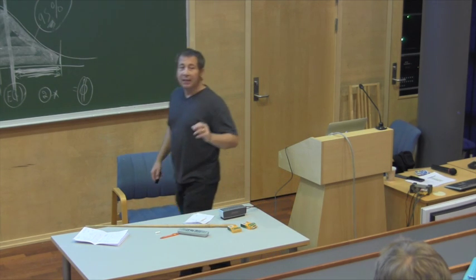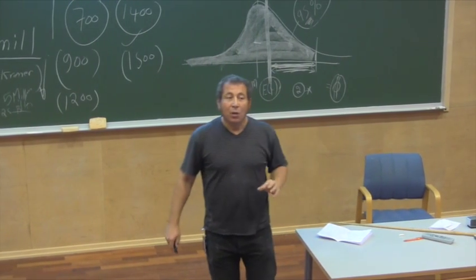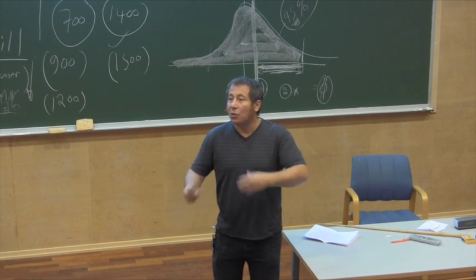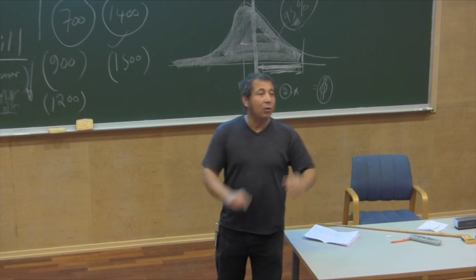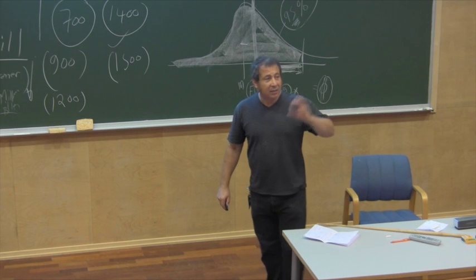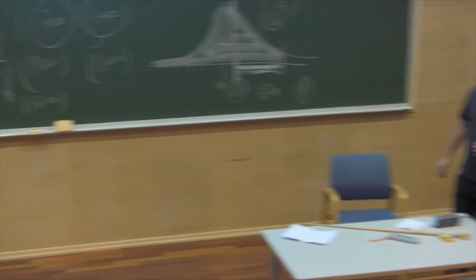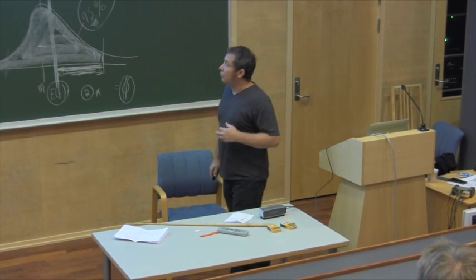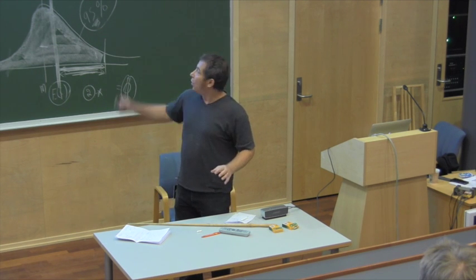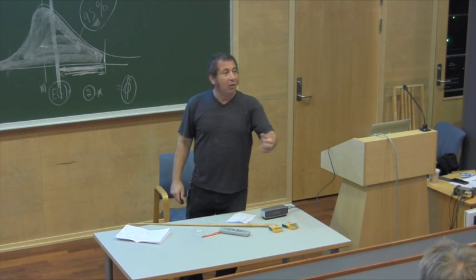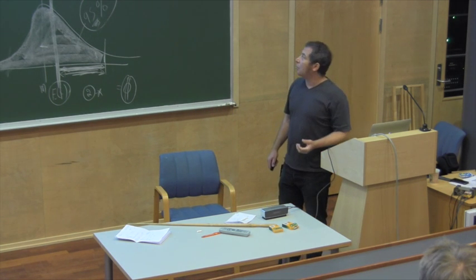And then they said, in this project, we have to plan a lot of things upfront. We cannot sit and wait and solve problems. We cannot do fast tracking, because with fast tracking, things can go wrong. So they based this project on very good, very early plans. And they were very clever to identify all the risks associated with this plan, and also to address all these risks up front before they could actually occur.